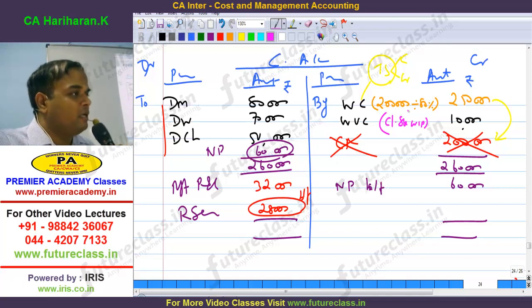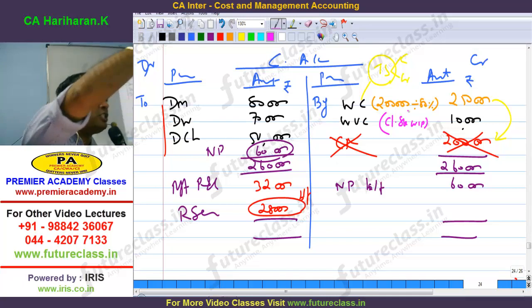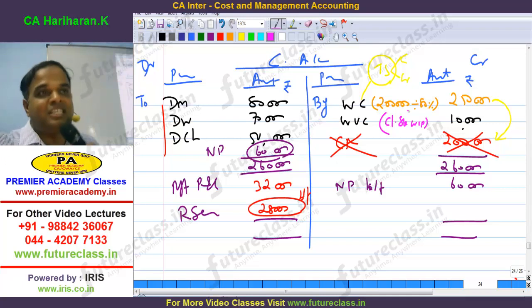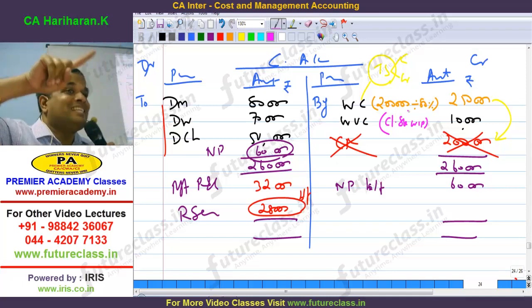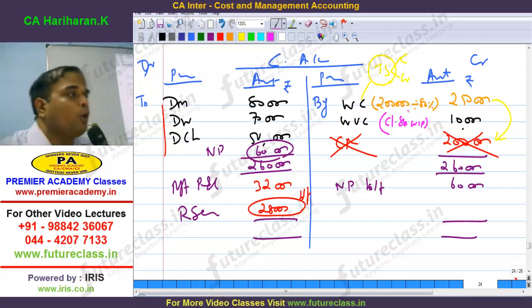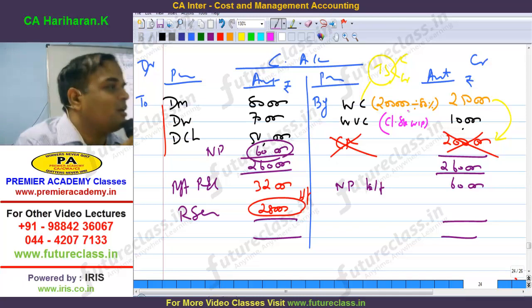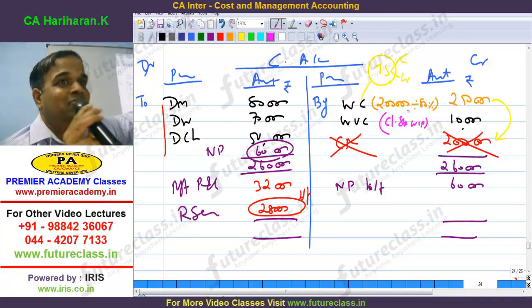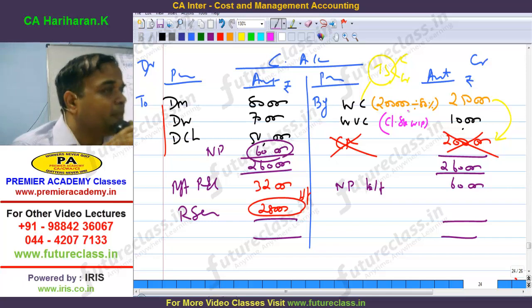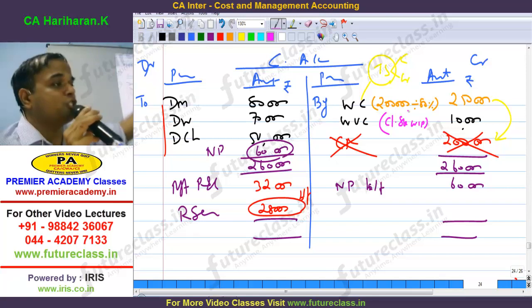Closing stock in inventory should be on the credit side. Then the closing stock of the previous year becomes the opening stock of the next year. Same logic for opening work uncertified. Are you with me or not? That's why we put work uncertified at cost and work certified at sale value. That's logic, or not? Sales revenue. Therefore, sale value. Work uncertified you have to compute always at cost or NRV, whichever is less, the same concept, sir. Clear? Because it's a stock, we have to value it at cost.